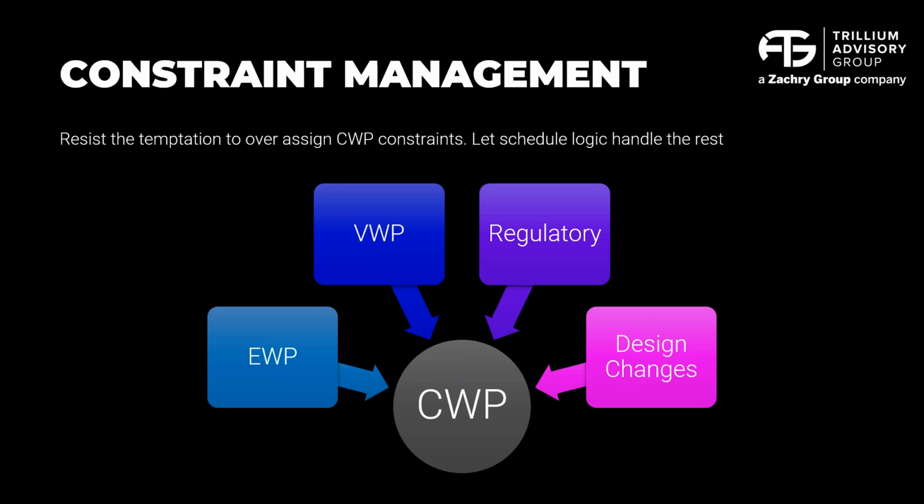If we're able to look at those and talk about those design changes early, construction may be the right time to start resequencing some work. But again, not very early. Wait till enough engineering has been designed, enough information has been shared before you start making those commitments on the construction side, because that's where we tend to lose control of those budgets and time.